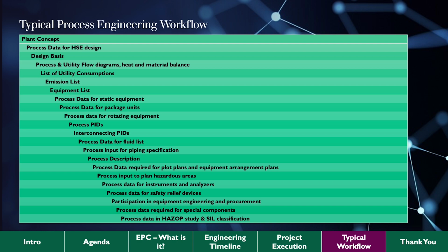Here is the natural gas. Here is the catalyst that we are going to be using. Here is the type of utilities we're going to be using. Utilities, everything: instrument air, plant air, nitrogen, cooling water, demineralized water, what type of raw material I have. All these things are going to be detailed there. And even the standards and codes that have to be followed. Because if I'm in Europe, I might have a standard of codes that is different than in the United States.